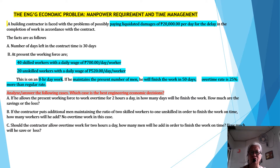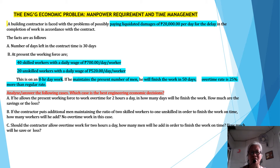A building contractor is faced with the problem of possibly paying liquidated damages of $20,000 per day for delay in the completion of work in accordance with the contract. The facts are as follows: the number of days left in the contract is 30 days. At present, the working force consists of 40 skilled workers with a daily wage of $700 per day per worker, and 20 unskilled workers